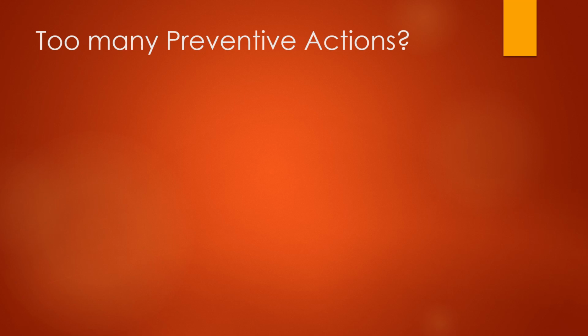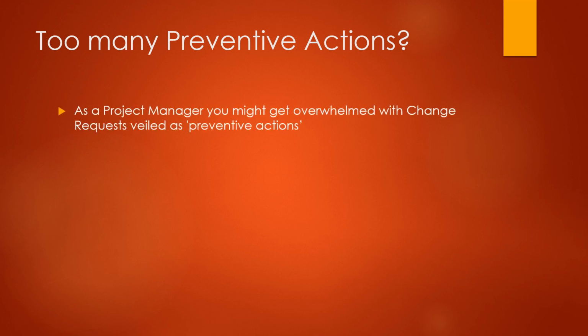And what could end up happening is that you would receive a lot of change requests from the team who believe that they are suggesting preventive actions. So as a project manager, you might get overwhelmed with the change requests that are wheeled in as preventive actions. The coders might come to you and say, we estimated that we'll complete something in 2 weeks, but it seems we are going to take 2 months. So let's do this as a preventive action.